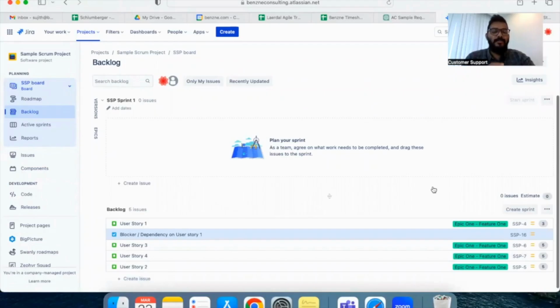So everyone, sprint planning meeting is the first ceremony which we do when we start the sprint. It usually happens on day one of the sprint. The first half we take for the sprint planning meeting. For a 2-week sprint, the sprint planning meeting is time boxed for 4 hours maximum. So this is the ceremony where we plan for the next 10 days.